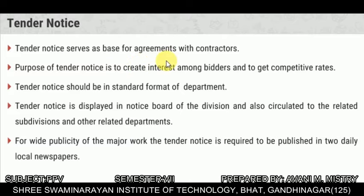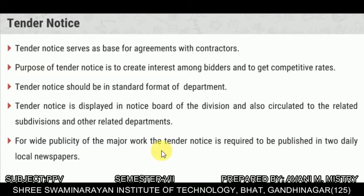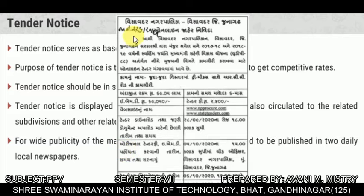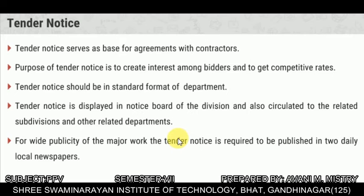Tender notice serves as the basis of agreements with contractors. The purpose of tender notice is to create interest among bidders and to gain competitive rates. The notice should be in the standard format of the department and is displayed on the notice board of the division, circulated to sub-divisions and other related departments. For major works, the tender notice is required to be published in two daily local newspapers.